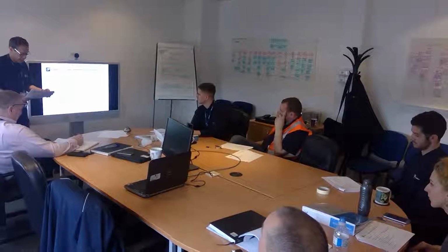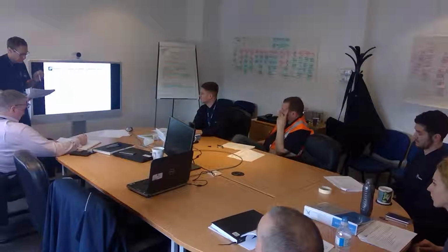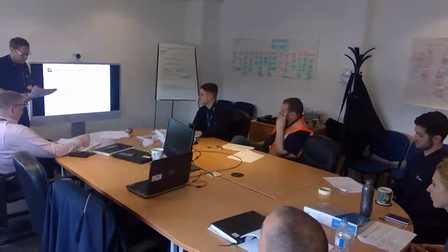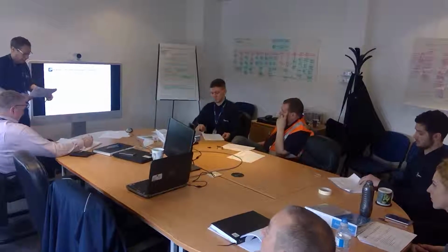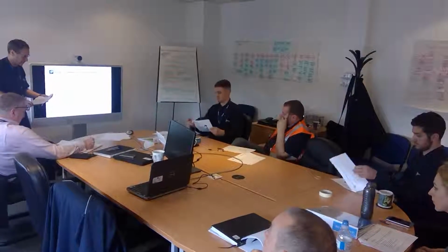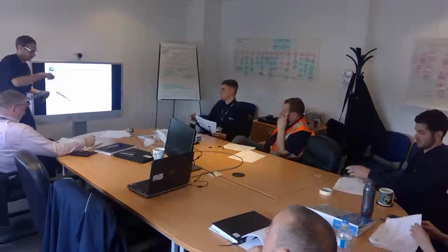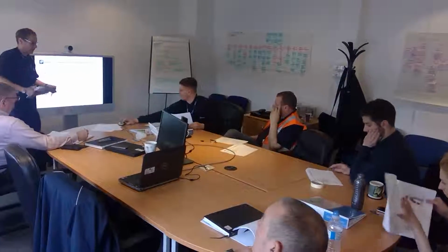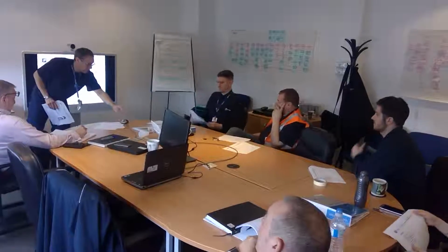We need to identify space requirements, we need to identify transport and handling requirements. We need to be fully aware of the programme, what long lead time materials there are, make sure they're ordered and keep a specific track on them, and then obviously any other business. So I can hand over to Jake to summarise.